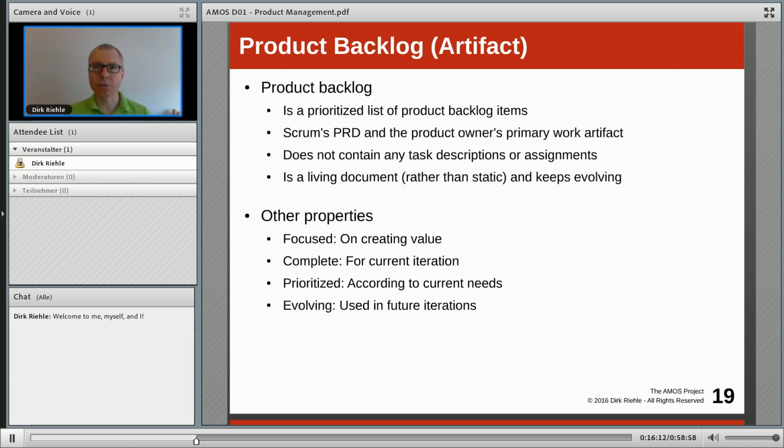Entries further down the road, meaning further down the product backlog, may be less precise. They are awaiting more refinement, but are also not yet ready to be implemented. Even further down, you may not even have precise entries any longer, but just placeholders for upcoming requirements, or placeholders for whole categories, themes and epics, which we'll talk about in a bit, that represent whole feature sets.